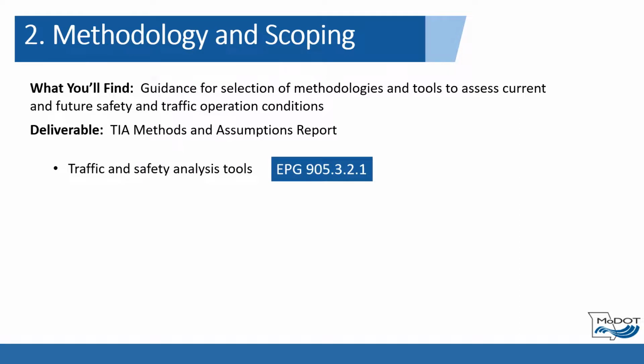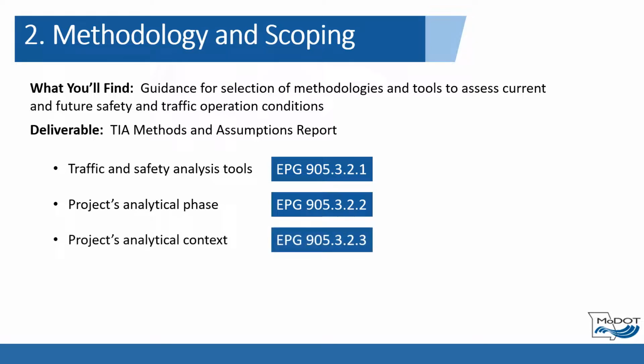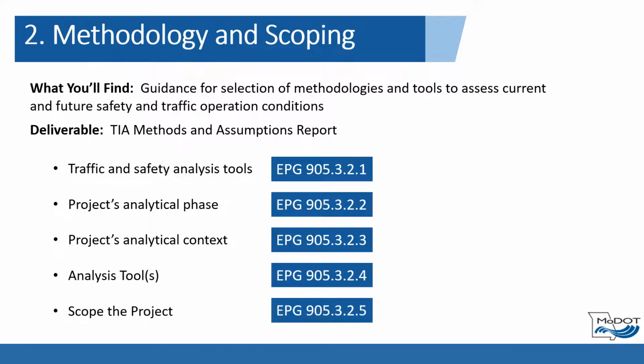Understand available traffic and safety analysis tools. Identify the project's analytical phase. Determine the project's analytical context. Select appropriate analysis tools, and scope the project through the completion of the MoDOT TIA Methods and Assumptions Report template.